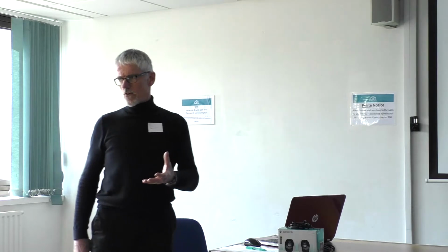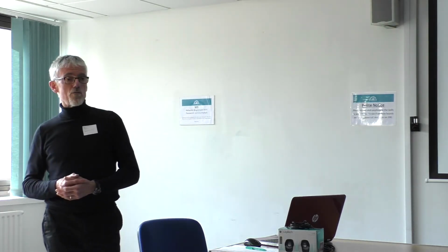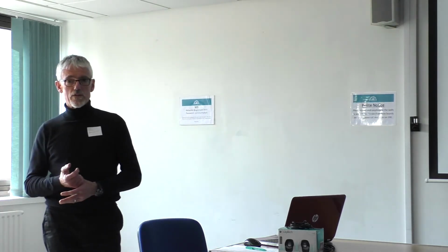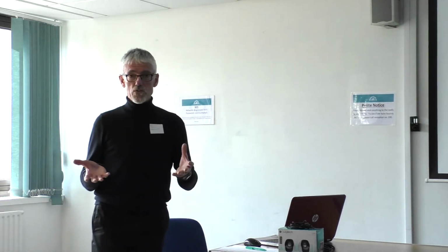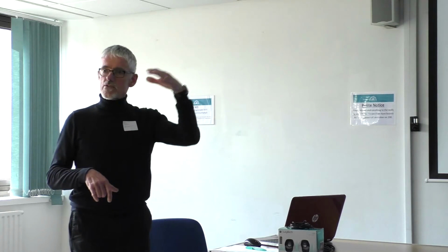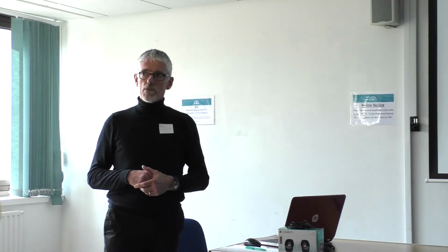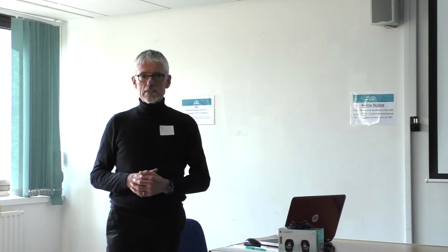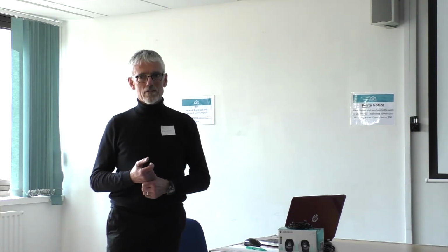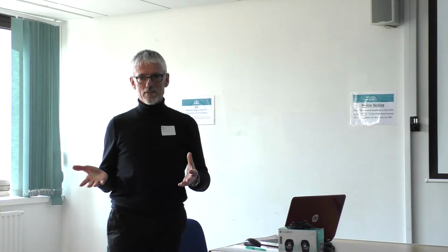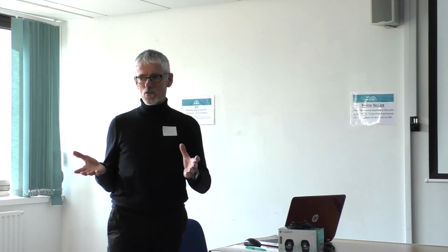It's quite difficult because you will quite often need building regs permission, you'll need planning permission, potentially you'll need change of use permissions. So there are lots of permissions you need to achieve where someone else might not need those. And so again, you need to try and think, well, will we gamble to buy it when we're not really ready? And that makes it quite complicated as well.